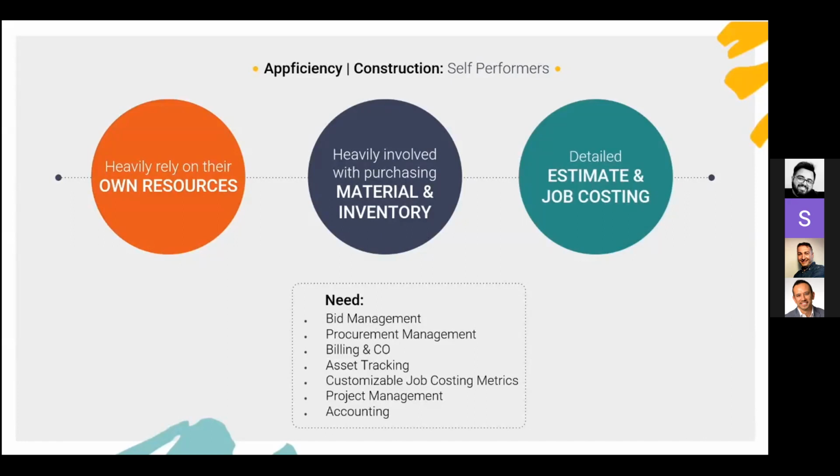And not only that, now you need to keep an eye on your budget, how much money you have in your hand, in your budget, how much you spend with your purchase orders, how much you paid or you receive invoices from your contractors, and then how much you bill your customer. Consider the change order in between, and now seeing at any point of time, the big question in every single construction project is, am I going to make money or am I going to lose money? Do I have enough cash flow or not? At every single period of your project, this is the key question to be answered. And that's why this MJC can help us.